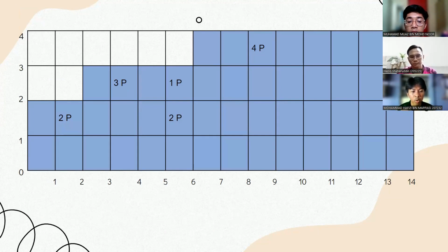So our target is always to make the resource usage level as smooth as possible, because moving people in and out of the site is very costly. So hiring or adding more people for more days in one shot may be cheaper. People are more efficient if they can focus their effort on one project rather than multitasking. As the saying goes, time is money. So you can see why most project stakeholders give more importance to the time concern than any other concern.